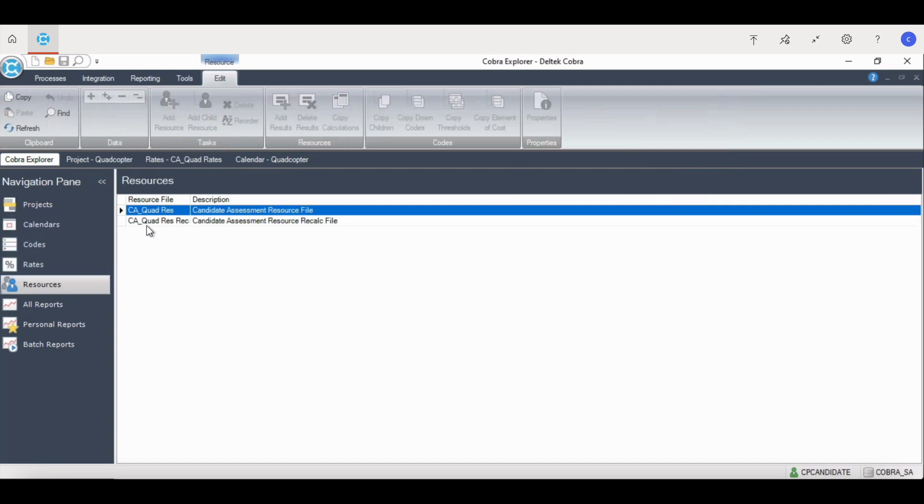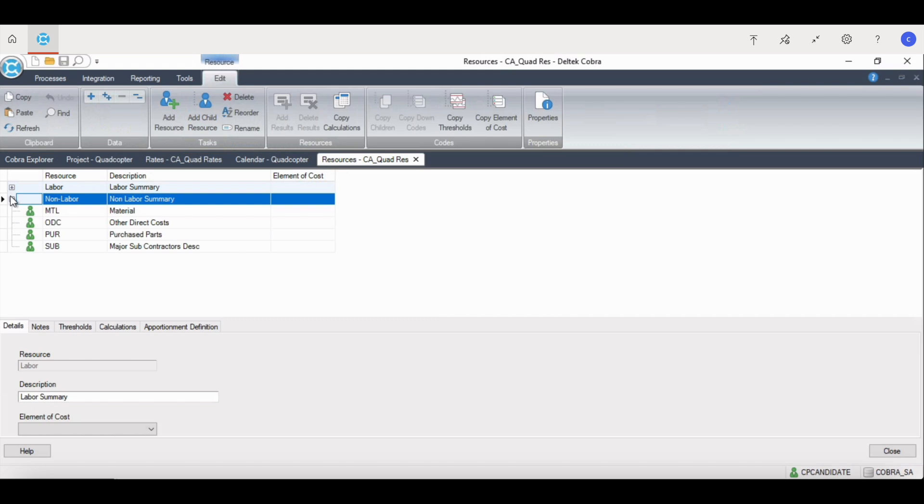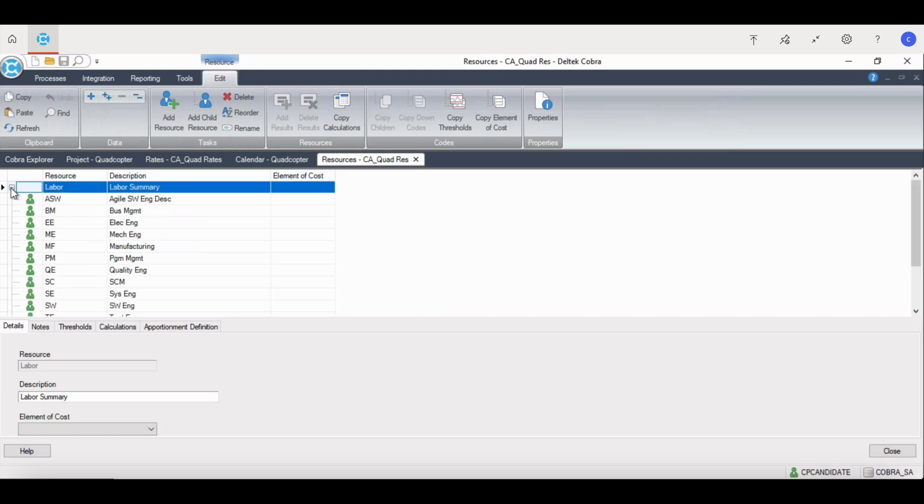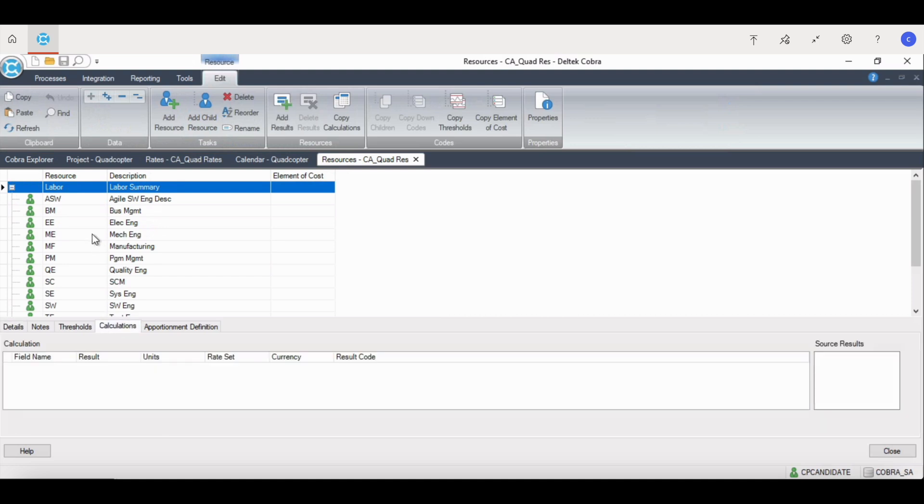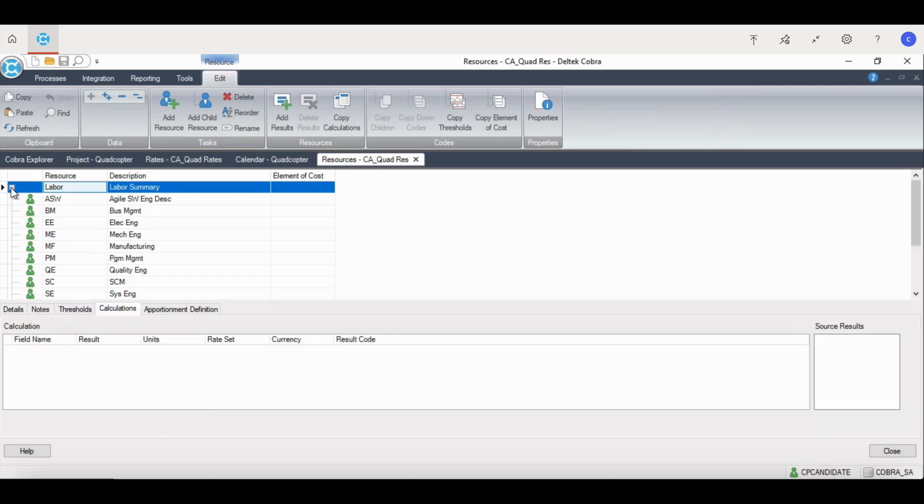After the calendar is created and the rates are created, the next step of ancillary files are the resources. The resource file has two main components: the basic resource structure and resource cost calculation, which is the cost buildup from hours through total burden cost. The resource file can be a flat structure or can be built using a typical breakdown structure.